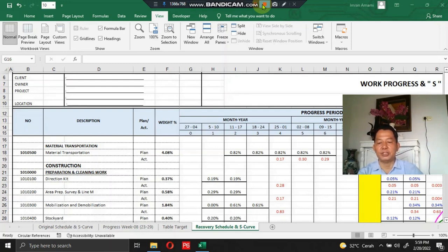There are changes in the scope of work, and changes in the construction drawing because it is not the same as the actual condition of the work on site, so modification needs to be made. There are also force majeure events such as natural disasters, floods, landslides, fire, earthquakes, storms, tsunamis, and others. All of these reasons can be causes of delays in the completion of construction work.